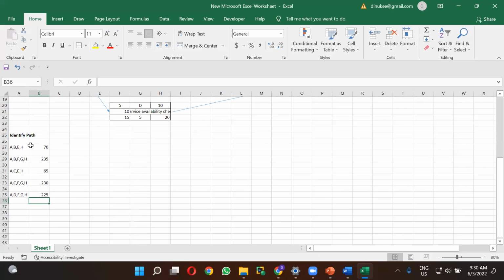So what is the critical part? First one or second one or third one or fourth one or fifth one. You have to take the highest duration, right?